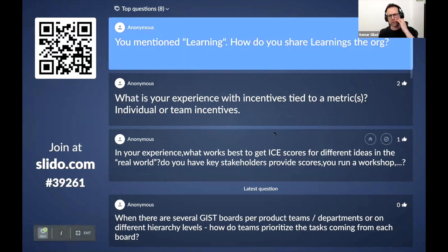So basically, every time you go out into a step, every time you test an idea, and the test can be as simple as we ran this landing page, or we did a phone interview with 15 users, or we ran a dogfood inside. Immediately after you have the results, you analyze them, you ask yourself, what did we learn? Sometimes it's good to do this in a team. Some companies like Netflix have a regular weekly or biweekly meeting where people bring their experiments, and some veterans sit there in the meeting and help them analyze them.